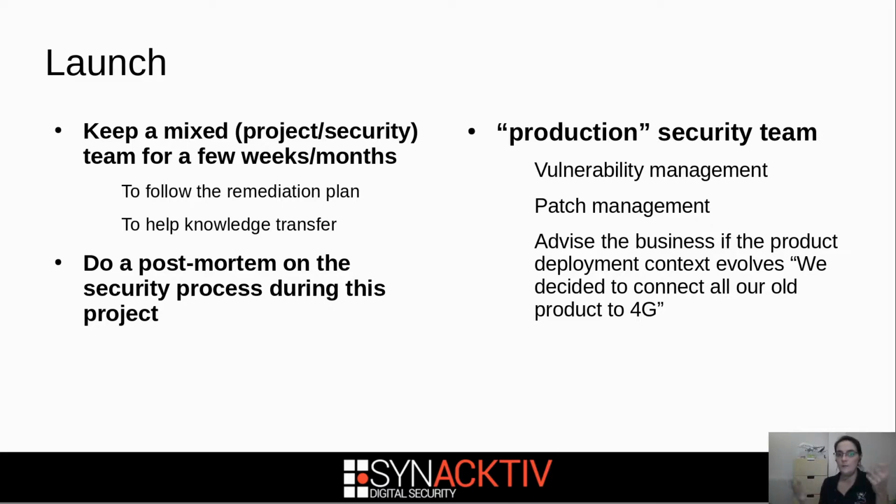For example, to follow the remediation plan and to help knowledge transfer. It's also the time to do a post-mortem on the security process, so discuss with the project, with the risk owner, with the security engineer, what you did right, what you did wrong, what did not work, why, trying to get the lessons of your experience and share them internally.